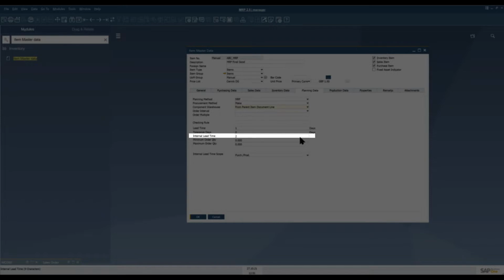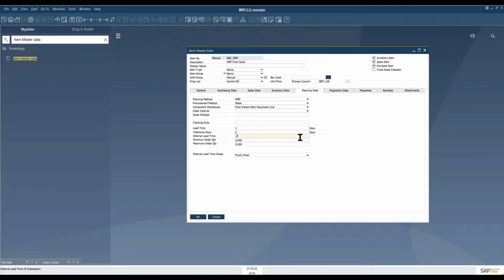And here, this data is valid for all suppliers, but as you'll see shortly, we also have the possibility to define lead time and internal lead time according to specific suppliers, and we can override these parameters there. So if we have a very reliable supplier, we might need to do fewer quality control checks on goods from them, so we can make the internal lead time a bit shorter just for that supplier. This is a topic that I'll come back to a bit later.